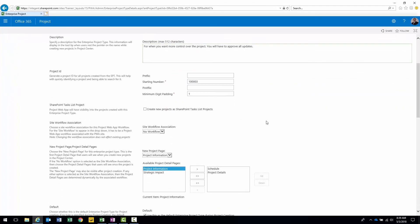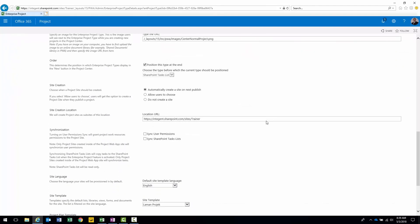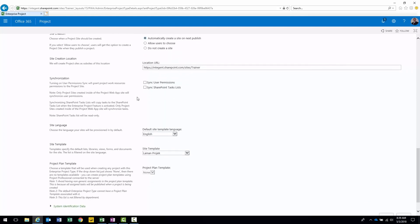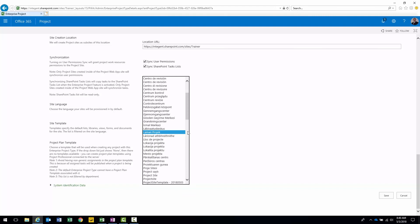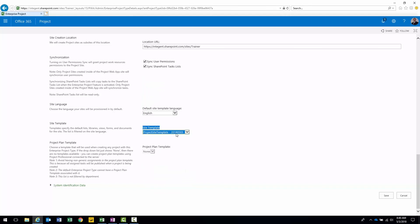Let's click on enterprise project. Let's note a couple of settings in here. Site creation, important setting. Would you want to automatically create sites every single time and make it mandatory? Or would you want your users to be able to choose whether or not a site's created? This is where that setting is. Would you want the tasks in the project to synchronize with the tasks in the list in the project site? Would you want it to show up on that timeline view? Also, would you want user permissions to synchronize with the project site? Typically you want those things to take place. I'm going to select both of those. And then lastly, site template. This is where we're going to locate our new project site template. There it is, project site template 2018-05-03. Once we're done with that, we click save.